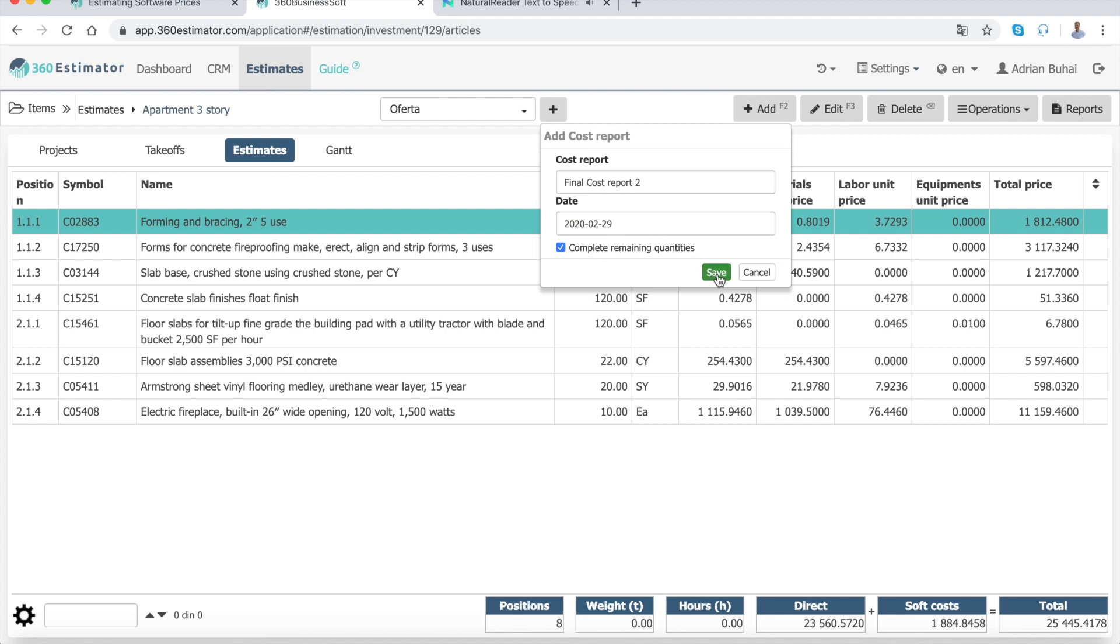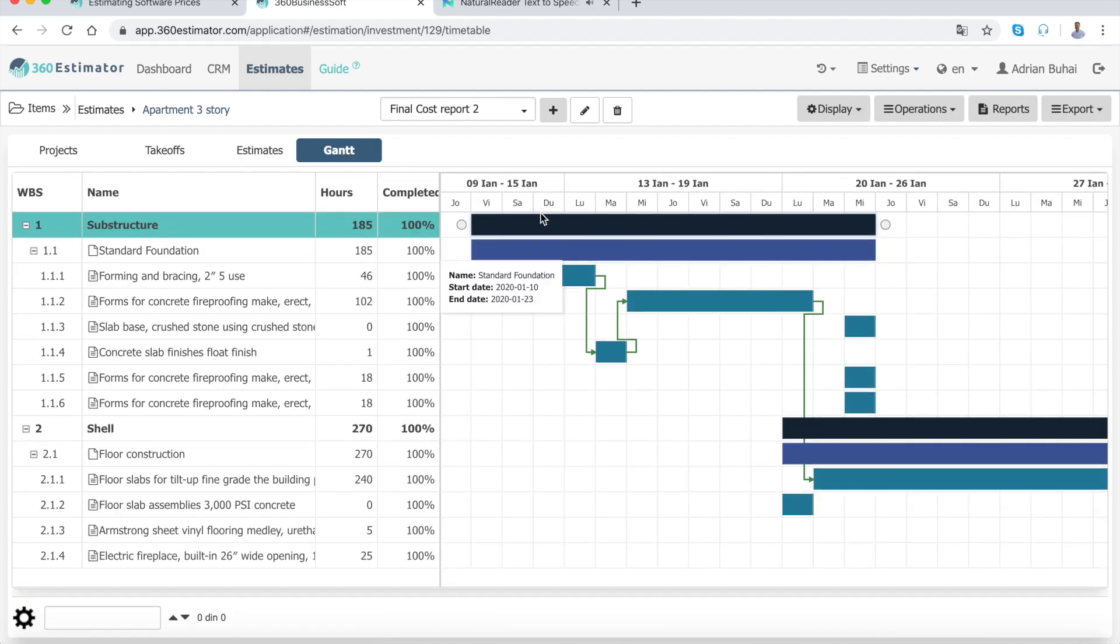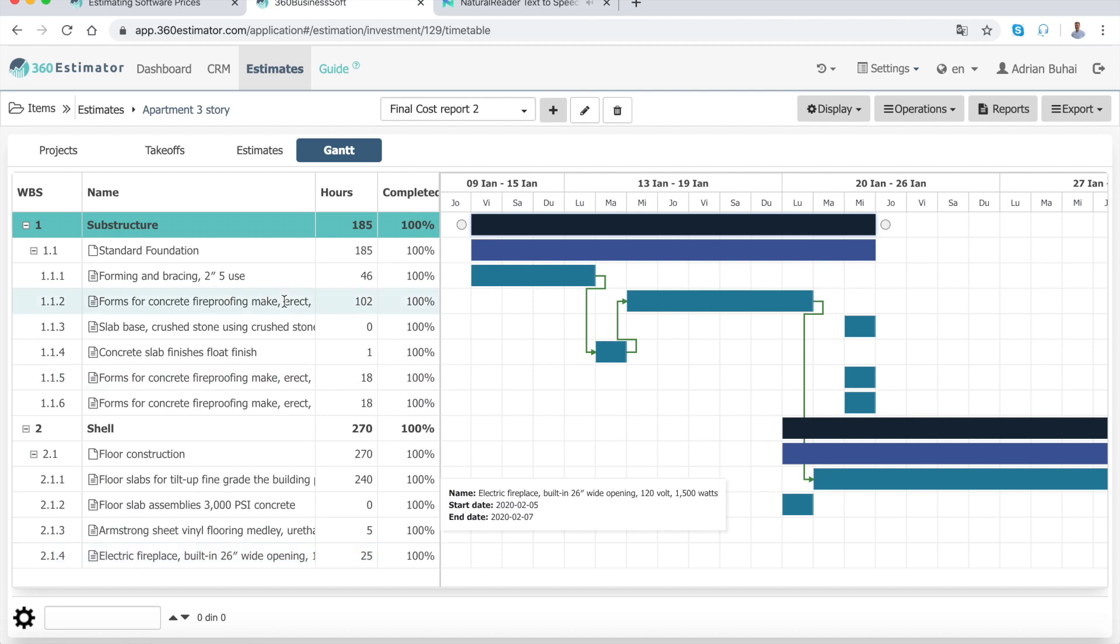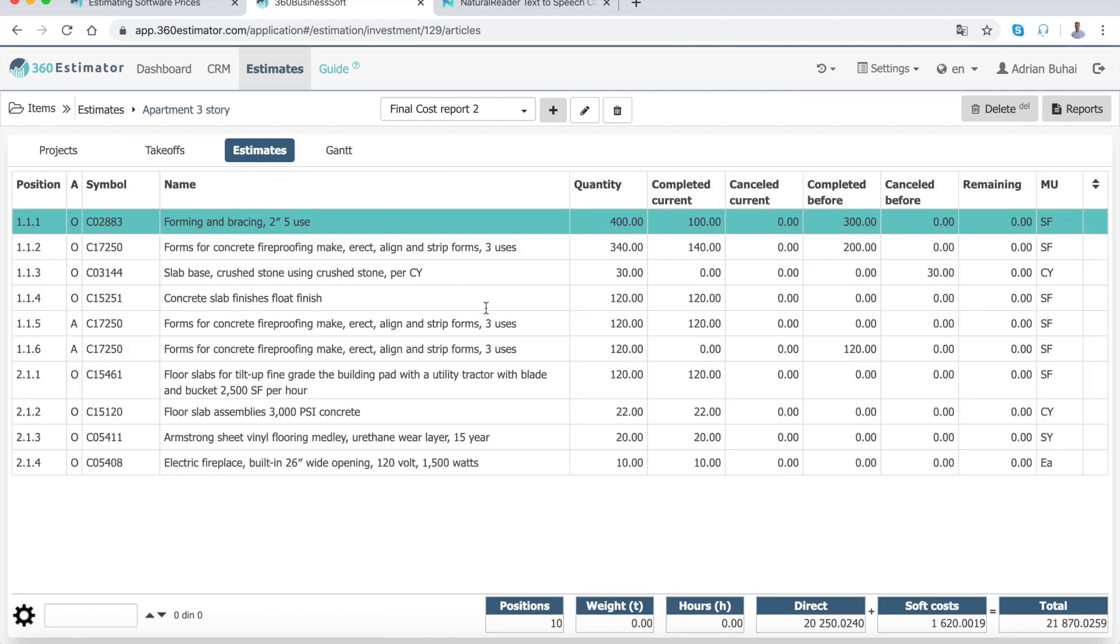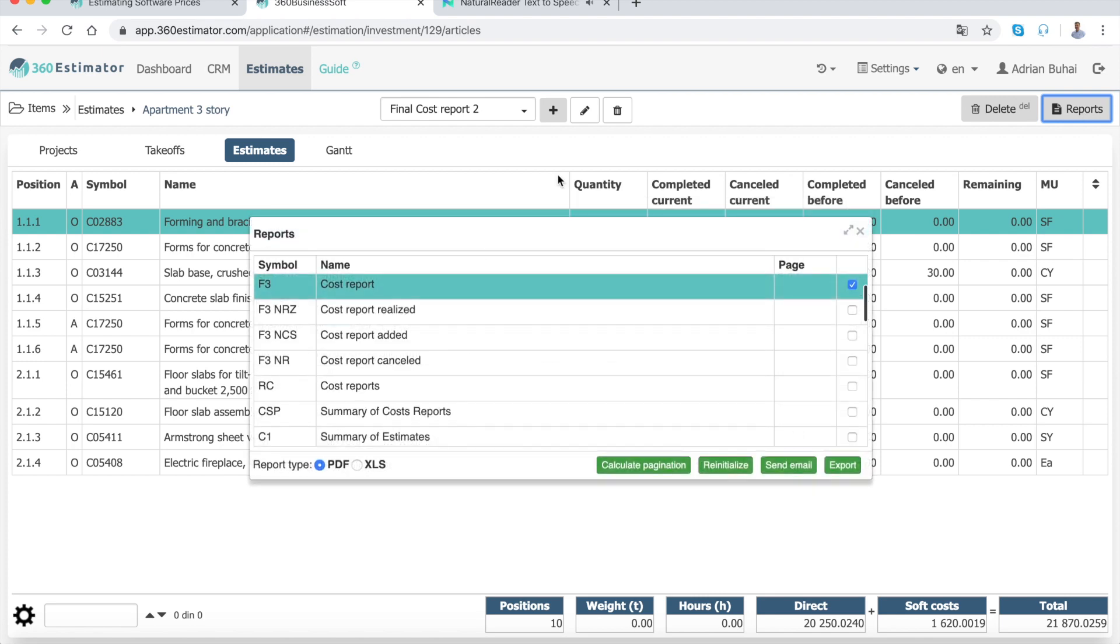The cost report is connected with your Gantt chart, and if you move on to your Gantt chart, you can see percent completed for each activity from your project. Finally, I will show you how to print a cost report. From the top right corner, press the reports button, choose the cost report or summary of cost reports, and press export.